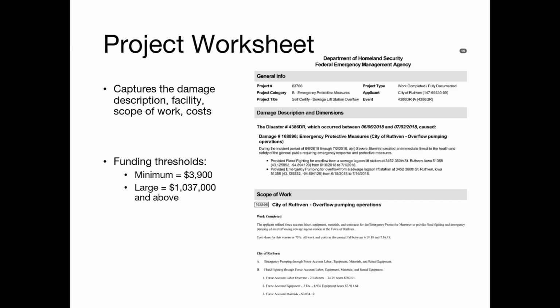Here in Iowa, for small projects, the federal share, 75%, is paid out up to $250,000 upon obligation. And then after that, you can receive up to 75% of the federal share through requests for reimbursements in our EM Grants Pro system.